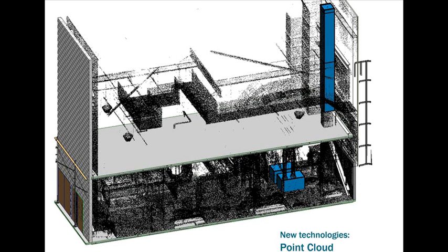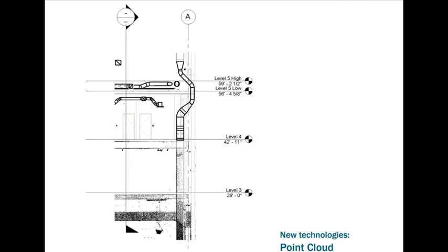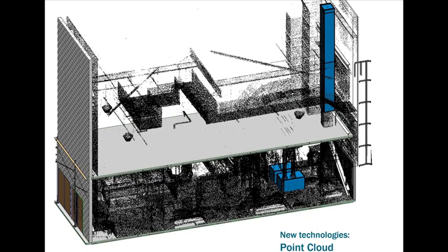is off by an inch, it's not that big of a deal. If the structure's off by an inch, it could be a bigger deal. If the architecture stuff is off by an inch, it could be a bigger deal. But as far as pipes and ducts go, I don't know. The jury's still out. And also that football field long basement stuff took me a week to do. A week of me going out there, whether it's about the same cost as a point cloud modeling, I don't know.